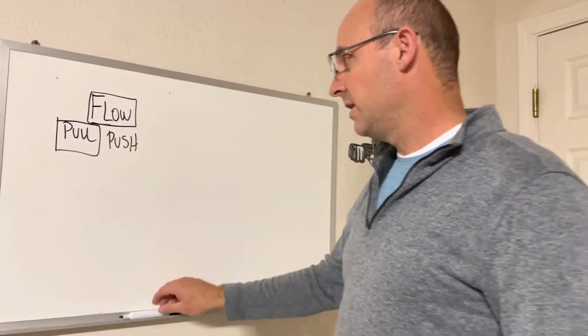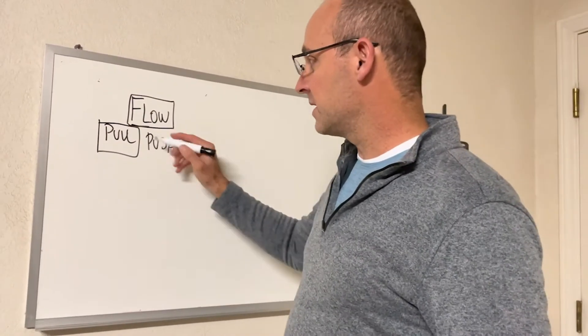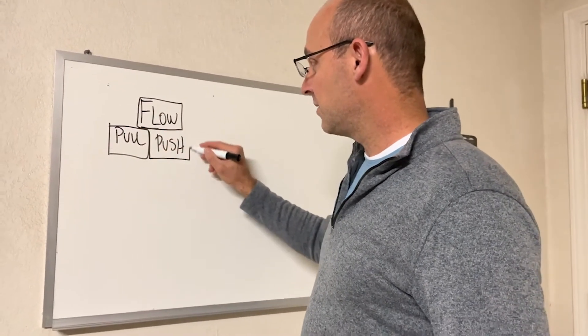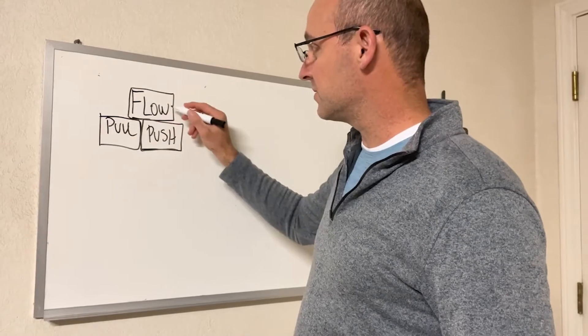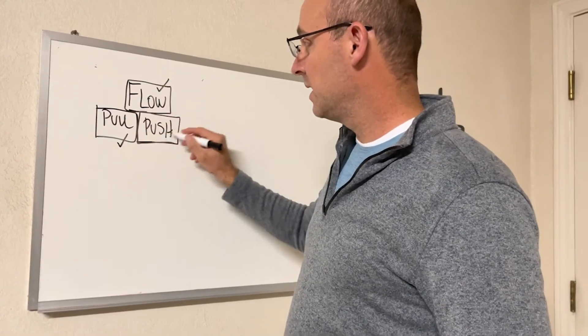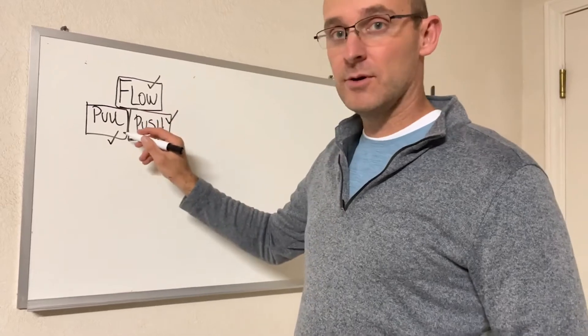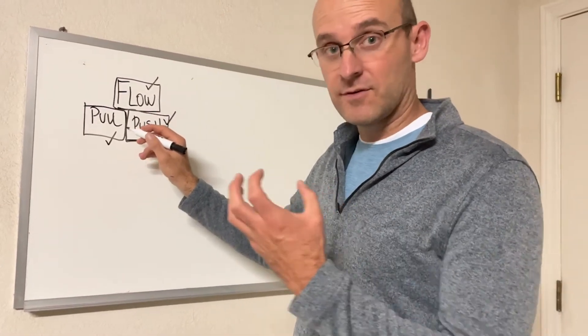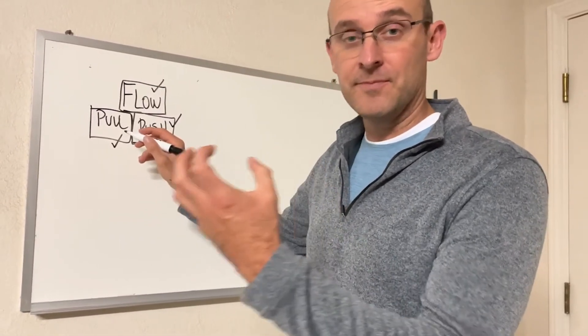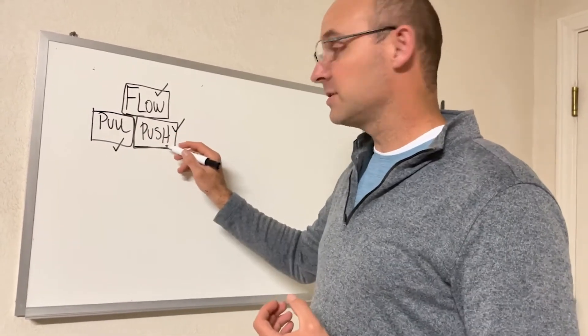And that creates variation and increased crew counts and increased material inventory. So when we talk about flow in construction, we need to understand in comparison to flow, pull and push. Again, flow: everyone's going the same pace. Pull: you're going the pace of the first contractor, whether they slow up or speed up.